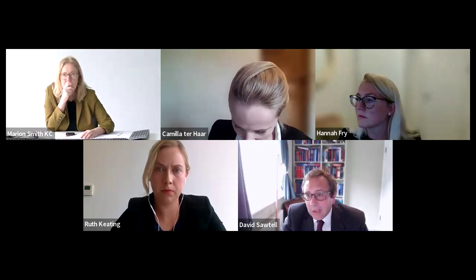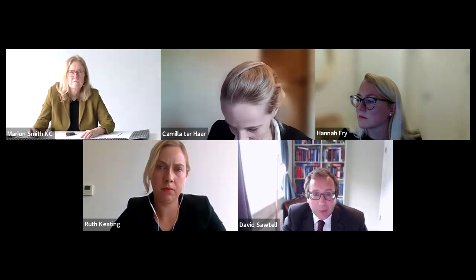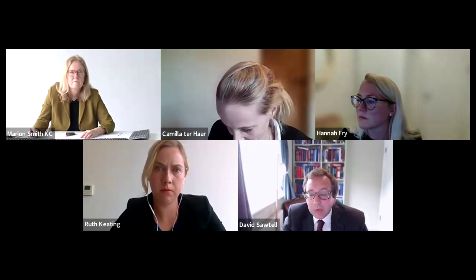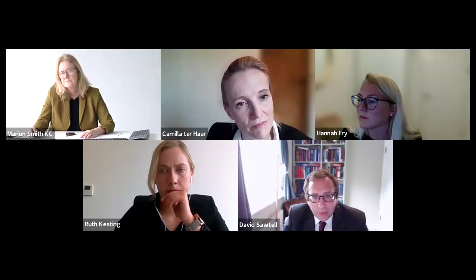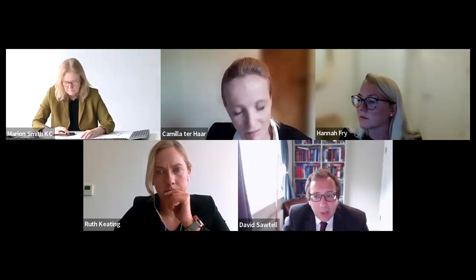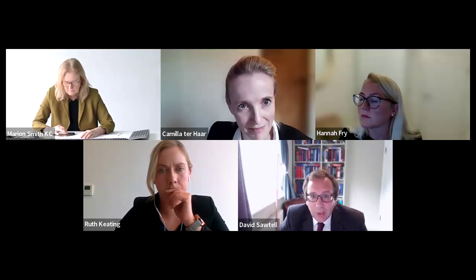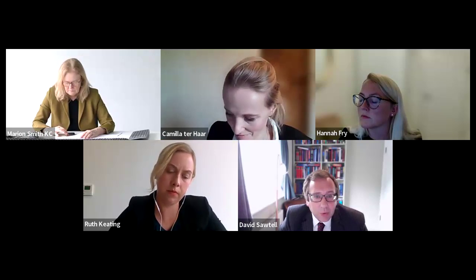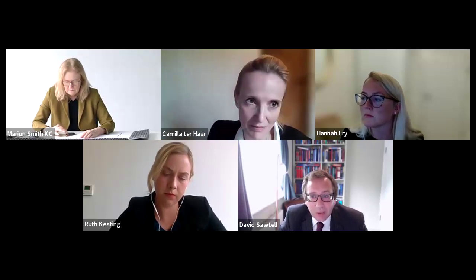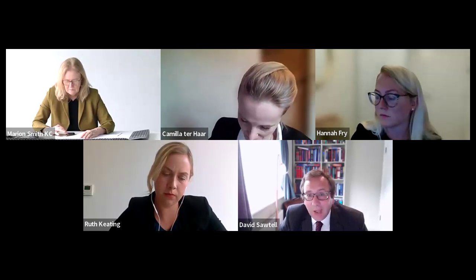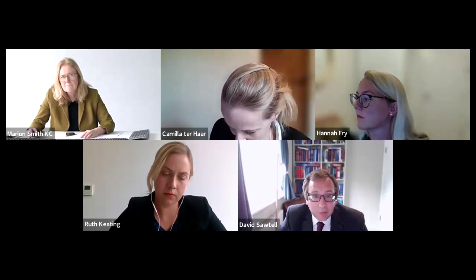So I think if you are going to amend or use JCT 24 and you're going to be serious about these procedures, you may well want to use it in a series of, for example, FAC-1 call-off contracts from a framework agreement, or you may have to have a whole set of documentation in the employer's requirements or contractor's proposals in order to deal with it, rather than looking to the standard form. You could easily see a standard form set of plugins in order to achieve what should already be in the standard form contract.